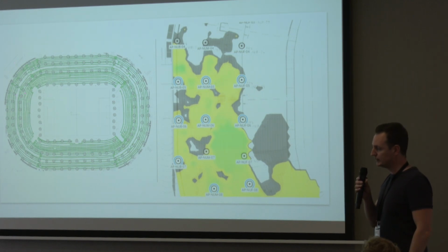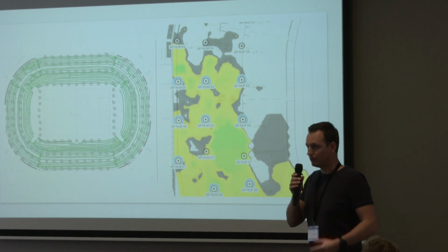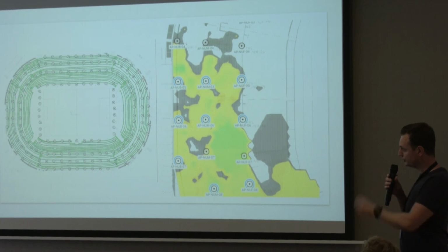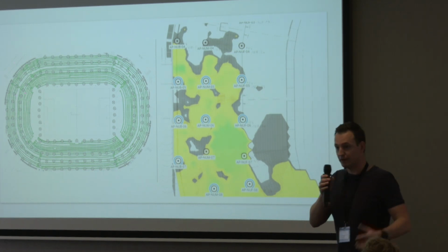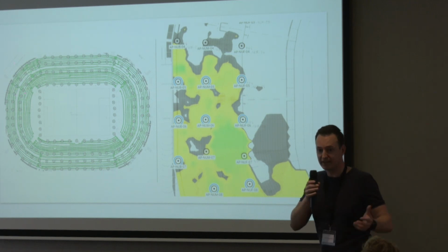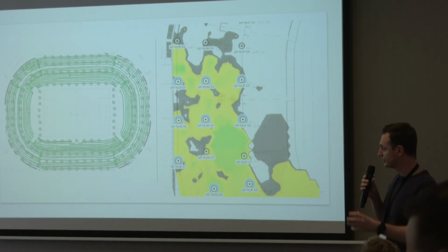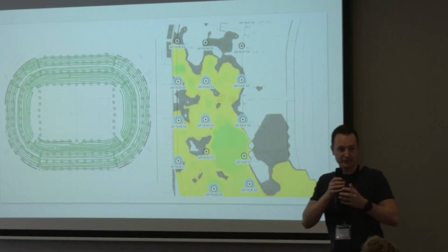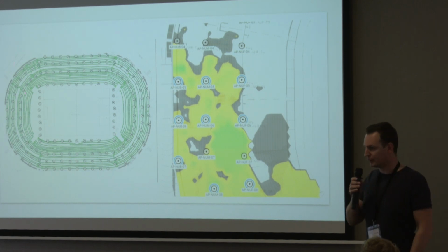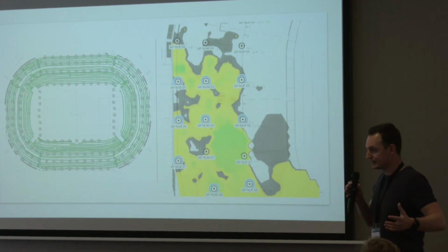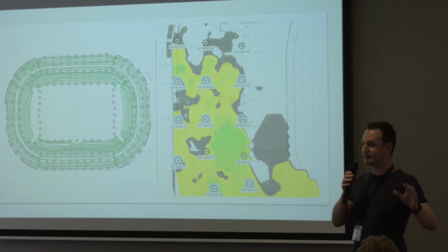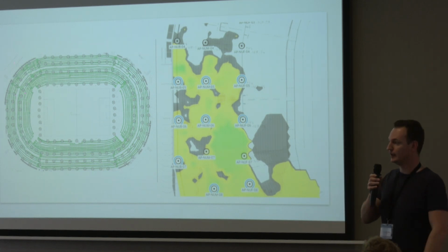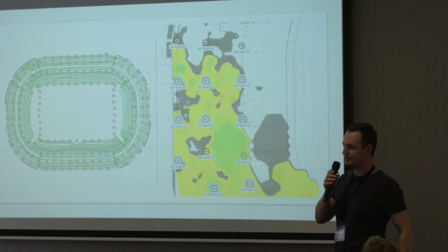But what we learned from it is about the mounting positions, whether we can reuse them, and that's really important to know. They were using an old technology, Wi-Fi 4, so if they upgrade to Wi-Fi 6 or Wi-Fi 7, it already gets a lot better. But the amount of positions must be good. I say that because we can start designing a new network based on all the floor plans, but the problem is, if we give that to the customer and say, here you have to place all the access points, they say, we cannot have cables there, the cables are too long, for safety reasons we cannot place the APs there.